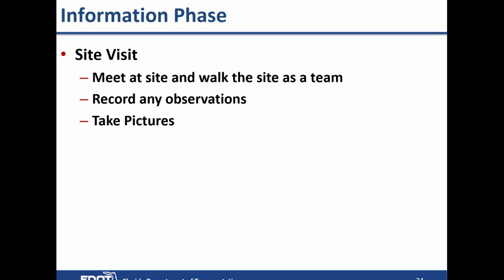After the team briefing, typically teams will go on a site visit. Now this has changed with technology. A lot of times you can get enough information off of Google Earth or some other means or method, video logs, and see what the site looks like. It really depends on how far away the site is from where they're meeting and how much time would be required to do the site visit. But we still do site visits. A lot of teams I've been on have done site visits.